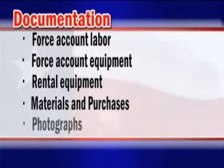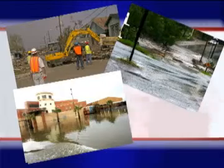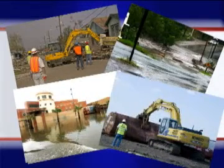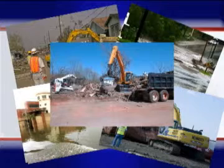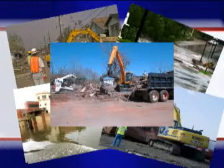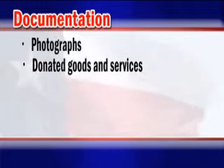Applicants should take and retain photographs of existing facilities. Following a disaster, applicants should photograph damage, work underway, and work completed. Photographs should be labeled or cataloged in such a way that someone unfamiliar with the project will be able to easily identify the subject of the picture. Records of donated goods and services should also be retained and filed.